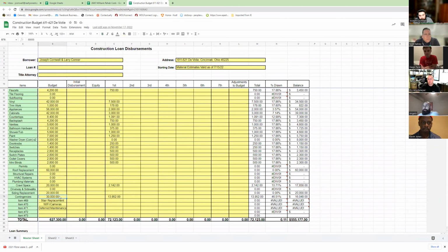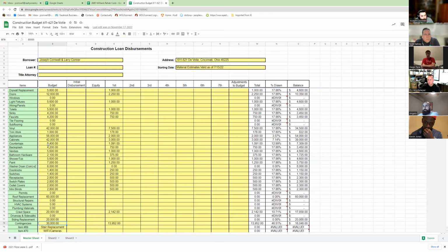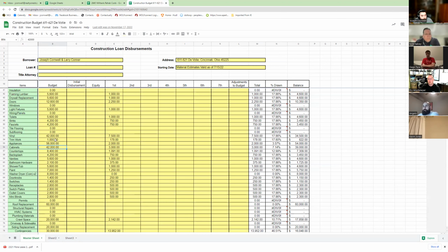This one here, the bank actually asked me to put a contingency number in, in and above our estimate. I had already put some contingency numbers in, but they wanted specifically one. I had to price out 28 kitchens, 28 sets of cabinets, 28 sets of square footage for flooring, for vinyl.